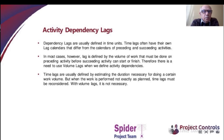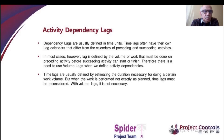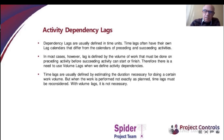Dependency lags are usually defined as time lags. For example, you may decide that the next activity will start two days after the start of the preceding activity. But typically, lags mean the volume of work that shall be done on the preceding activity before the next activity starts or finishes. Spider Project suggests using not only time lags but also volume lags, because time lags change as work is never done exactly as planned, while volume lags avoid this problem.